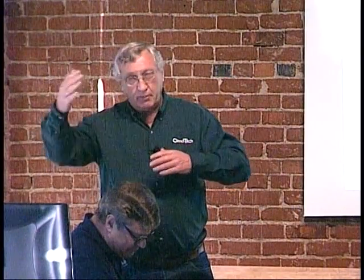And now I will do a little sales pitch here, because I'm going to pitch the concept, the selection process. I have taken RFP specifications from probably a dozen different jobs, and I've gone through and tried to pick out what I think was the best aspects of them, and I put together an RFP specification. It's a 10-page spec, and it doesn't specify controls. It just simply specifies how you respond to this request for proposal, and then there is an Excel workbook that goes with that. That allows you to look at multiple things. It has 500 points, a maximum.